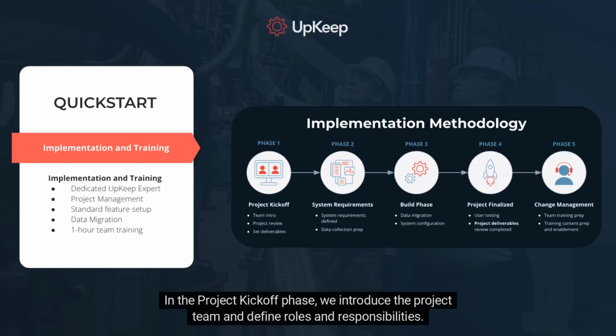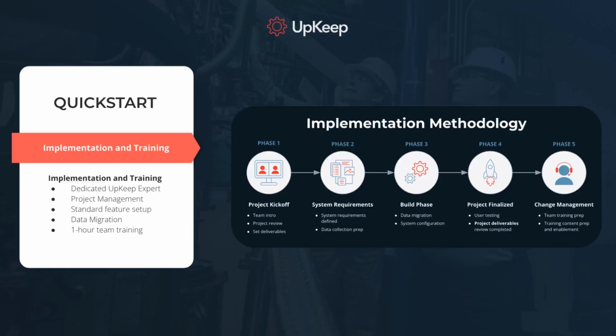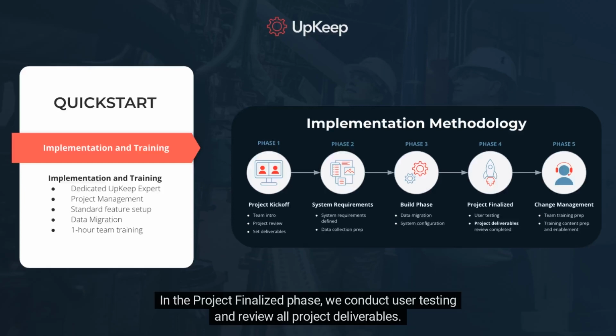In the project kickoff phase, we introduce the project team and define roles and responsibilities. We identify the system requirements in the system requirements phase and prepare for data migration. In the build phase, we configure the system to meet the defined requirements and migrate data. In the project finalize phase, we conduct user testing and review all project deliverables.